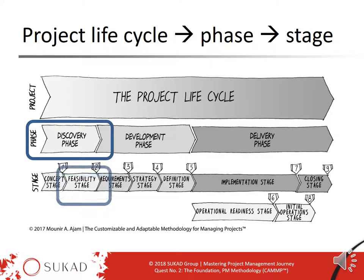We revisit the same standard model to highlight where the feasibility stage fits in this lifecycle. The feasibility stage starts after the approval of gate 1 and concludes with project authorization at gate 2.